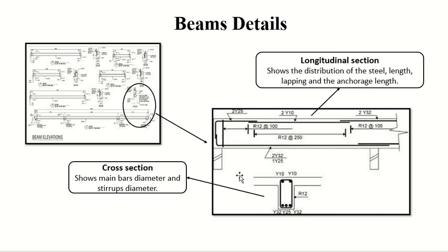When you divide something by the spacing, it gives you the number of intervals, the number of openings, not the number you are looking for. Get my point? Let me make it simpler.